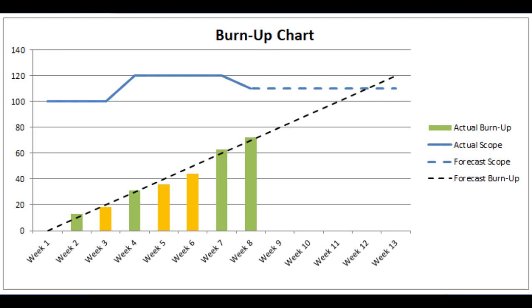Okay, basically for story points, for example, if there are 3 stories and each story contains 5 points, and we completed these 3 stories containing 5 points each, that means 15 is the velocity of the Scrum team, which is basically the average story points we complete in a sprint.